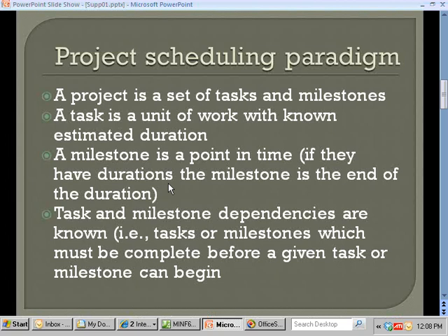But realize there's milestones and tasks, and we know what they are, how long the tasks take, but thirdly, in terms of the set of information, we know the dependencies. We know which tasks need to precede other tasks, right? You don't frame in before you've dug the basement. You don't put in the wiring before you've got the rough in on construction of the walls in a house.